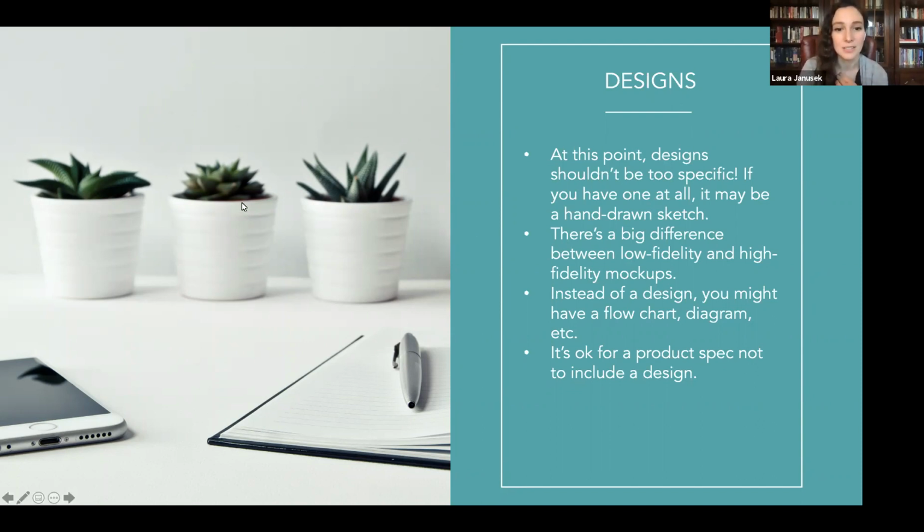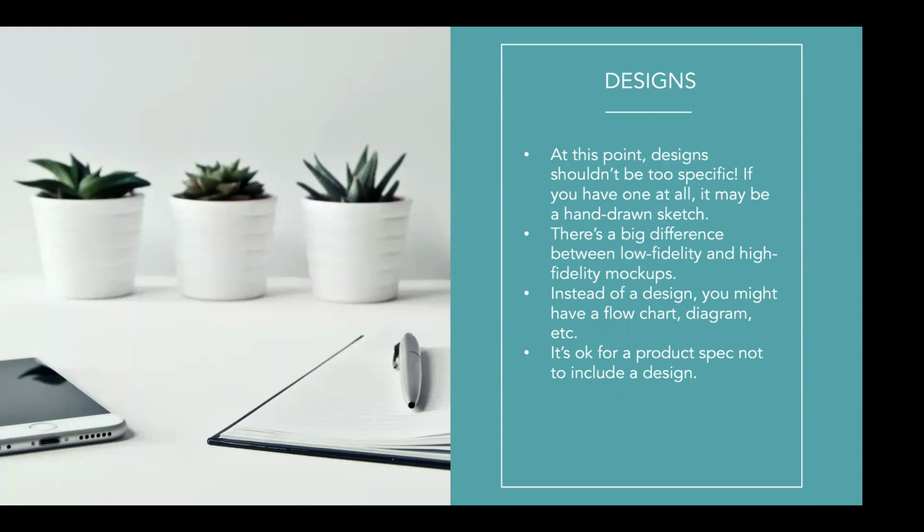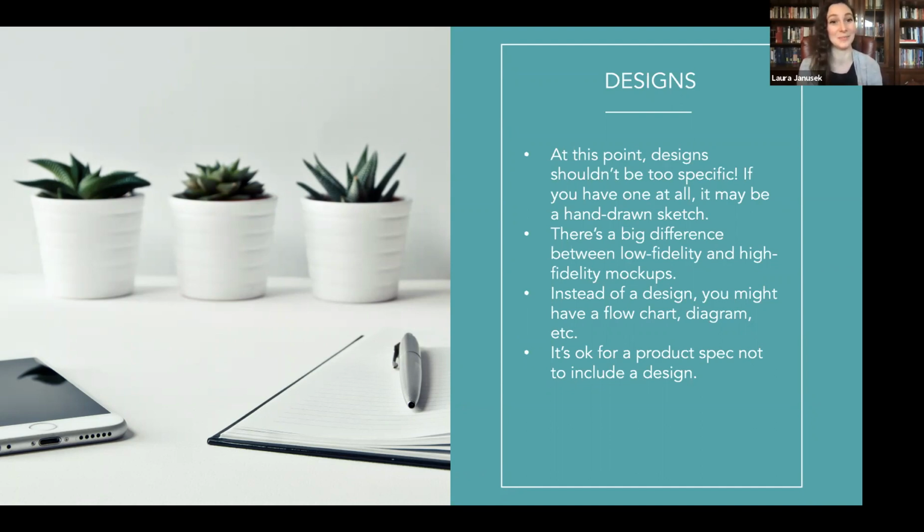Oh, I just saw another interesting question in the chat: do you think high fidelity mockups are necessary for the development team when it comes to build? I think it really depends on your dev team, on the comfort level of the people on that team. I've definitely started dev on projects where designs are not final, but that might mean that we're working a lot on the back end and APIs instead of focusing on the front end first. At some point, usually a high fidelity mockup is good to provide.